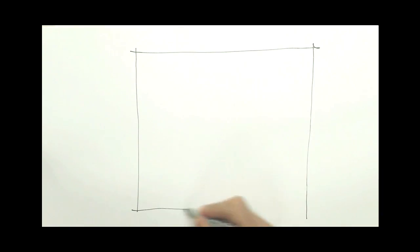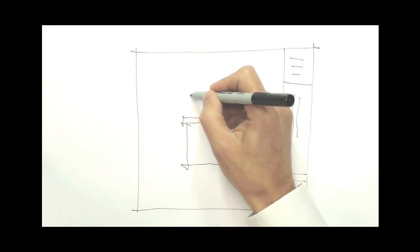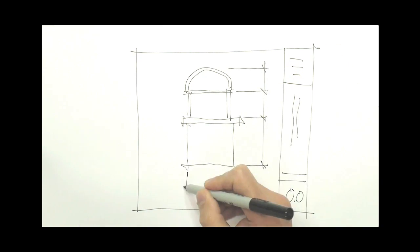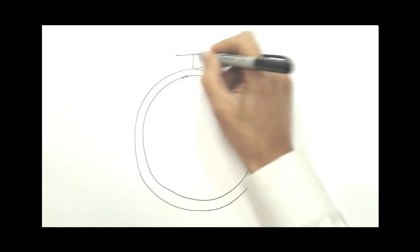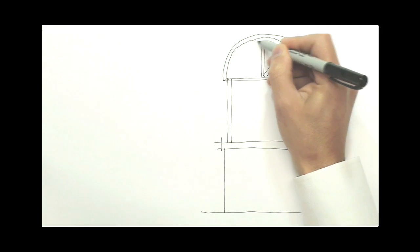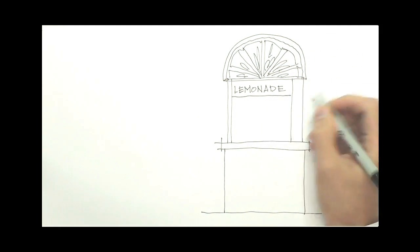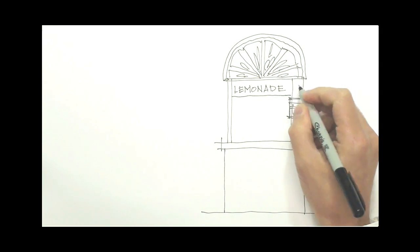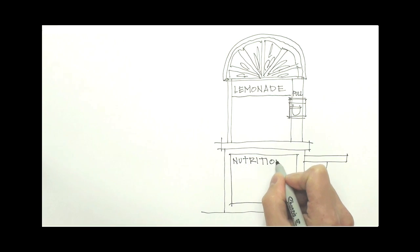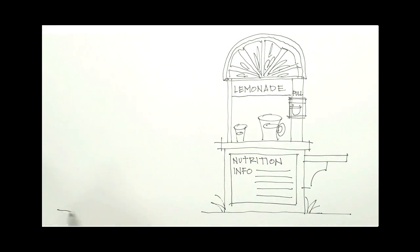The plans are completed, and the contractor applies for the permit. But wait, a different plan reviewer receives the plans and requests a change to the storefront. Time is spent changing the design, but when the plans are submitted again, the community's planning commission is upset because the elevations are now different from what they approved. Now the entire facade needs to be redesigned. After 3 months, the permitting complications are finally resolved, and the project starts construction.